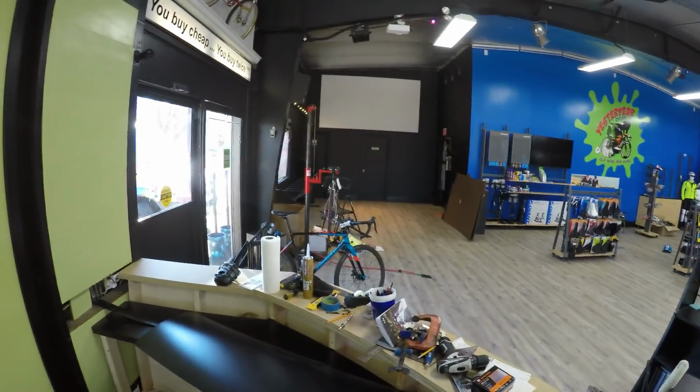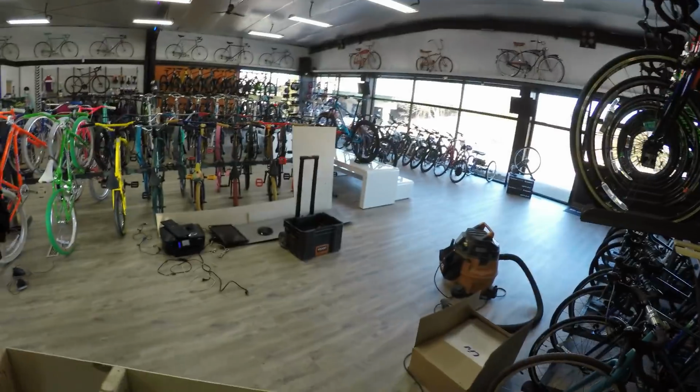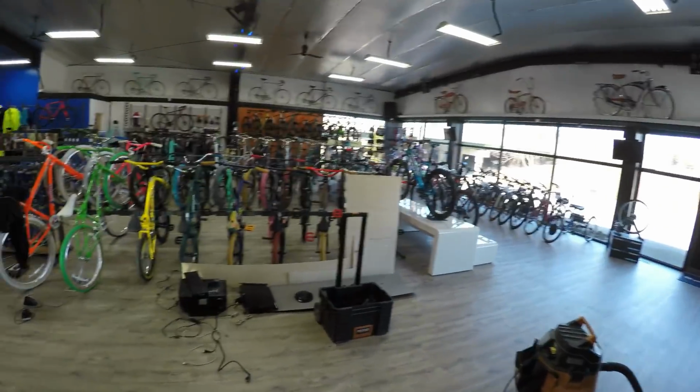And there's the theater. And pretty much, we're almost complete. We're approaching the April 1st soft opening, which is Monday, in 2 weeks. And at that time, we will open to the public full time, Monday through Saturday, 9 to 5. And we've scheduled a grand opening for the 16th of May, which is a Saturday, where all the local dignitaries, the mayor's gonna cut a ribbon for the grand reopening of Yesteryear Giant. And all the big shots from Giant themselves will be down, and it's gonna be a great party.